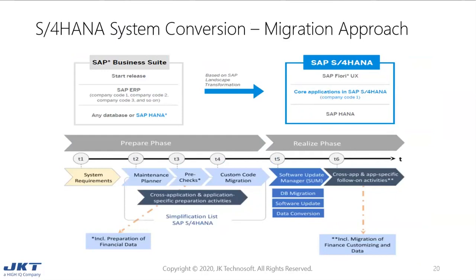Moving on to the realize phase: in T5, the SUM tool is executed — it performs the DB migration and the actual software update and data conversion. Next, in T6, cross-application and application-specific follow-on activities are done, such as adapting database extensions to S4HANA and adapting user interfaces.